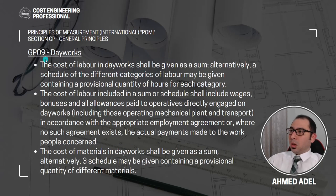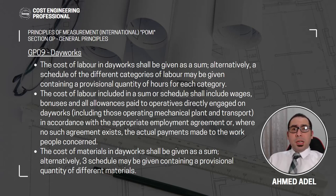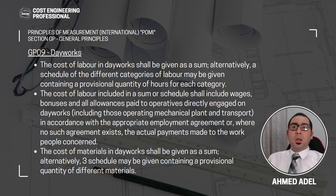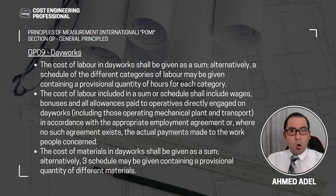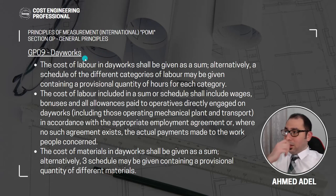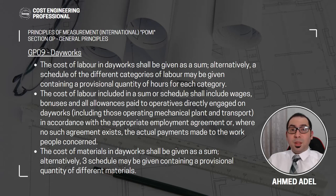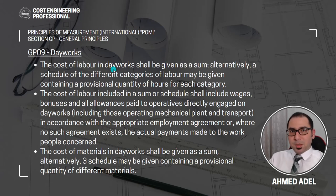Subsection 9 talks about day works. Day works is a schedule of rate-only items — labor and construction plant — that you keep at the end of your BOQ to finalize some variations or works not part of your original project scope. We keep rates for these items to use for that purpose. This section covers how to make the bill of day works and what these rates should include. The cost of labor in day works — such as unskilled labor, helper, mason, carpenter, plumber — shall be given as a sum.